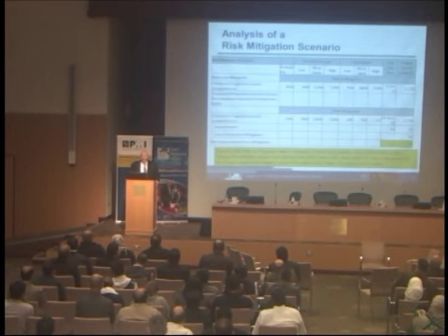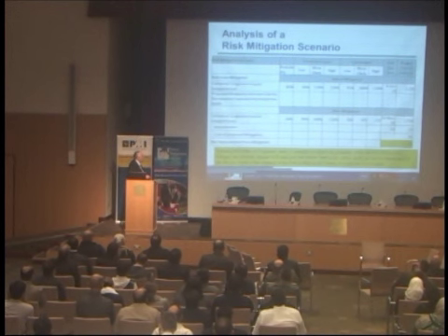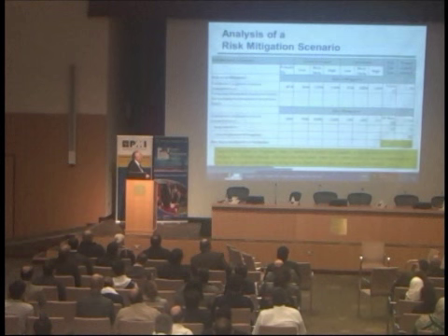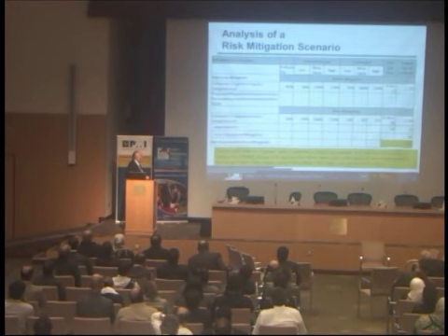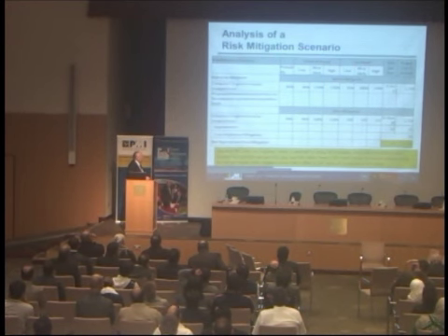Okay. I don't know how much it's going to cost, but let's say it's estimated to cost $35 million. If you do that, the probability goes from 85 to 20%, and the range, which was 90%, 110, 130, goes to 90%, 100, 110.